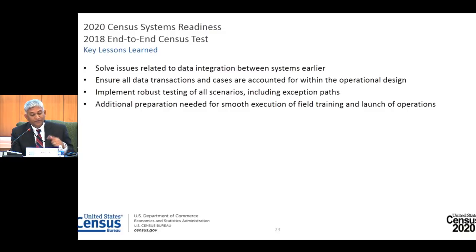Now for the final bucket, verification of systems for training and production operations startup, an important lesson learned is that additional preparations need to be conducted to ensure that key field operations trainings execute smoothly, and that large-scale production operations involving respondents, field representatives, or call center agents need to be verified as functional in the production environment before the actual start of the operation or the full launch of the operation.